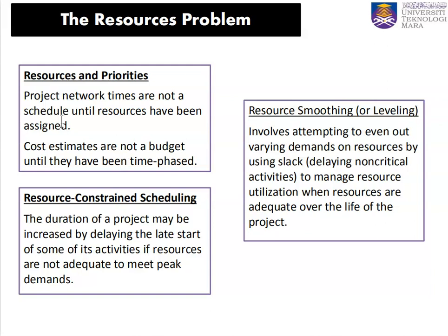So we have two resource problems that we will encounter. One is resource constrained scheduling, whereby the duration of the project is flexible, but the resources are not flexible.